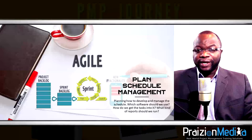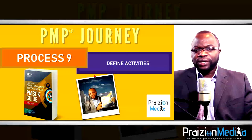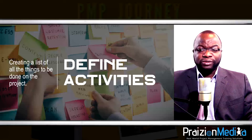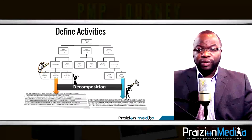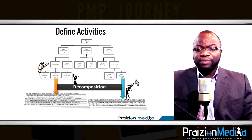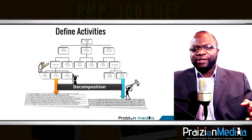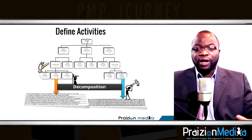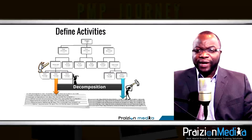Process 9: Define activities. This is where you create an activity list — it does not have to be in order. We take our work breakdown structure work packages and break them down from larger buckets of roughly 80 to 320 hours on smaller projects, into smaller pieces of maybe one hour, half an hour, two hours, three hours. That's define activities.